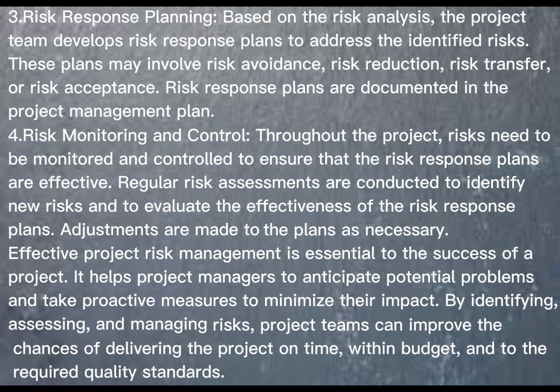4. Risk monitoring and control. Throughout the project, risks need to be monitored and controlled to ensure that the risk response plans are effective. Regular risk assessments are conducted to identify new risks and to evaluate the effectiveness of the risk response plans. Adjustments are made to the plans as necessary.